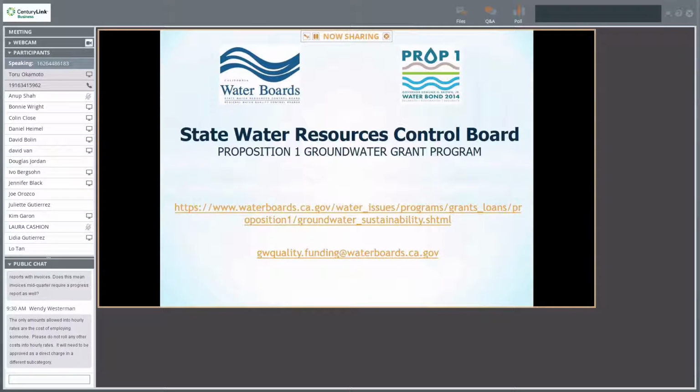Okay. Now, in addition to that, so the actual invoice that the subcontractor sends to us for payment, do you need specific details on that invoice itself? I think I'm going to let Tech answer this. They tend to want a little more detail than we had in the past. I don't think that we necessarily need to see a breakdown of hours and rates per individual person, but it's nice for us to be able to at least understand what tasks were worked on and the amount of money that was incurred towards a given task if they're working on multiple things.